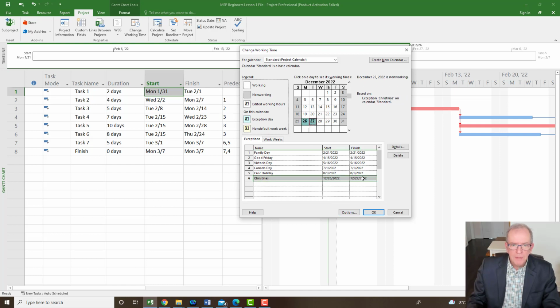On the other hand, maybe I'm going to take the whole week off because nobody's really working, so there's no point in scheduling stuff. So in that case, I'm going to click on the 30th. I'm going to click down there. Now I've taken that whole week off.